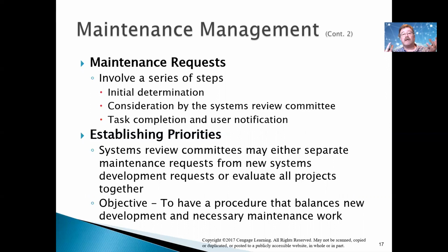So what I want is to facilitate: get the stakeholders together, have them look at all the requests and say, which ones do you think are important? In the world that I came from, we had the people, we had the finance people, the sales people, and the delivery or more operational people. Everyone thinks their own problems are more important. But when they get together in the same room, the finance people will say something like, well, if you don't get this done now, we're not going to be able to report our earnings to the shareholders. And all of a sudden everyone goes, you know what, that's important. You can work on that.